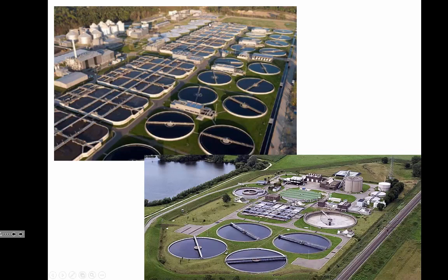Now, what could be a challenge as far as that goes? We've talked about bulk discounts in the past, and so how might that same idea apply here? What's a bulk discount? So if you buy a lot of something, you can often negotiate a discount with the supplier. So a facility that's this big may have some construction efficiencies and some material cost efficiencies that a smaller project like this couldn't capture.